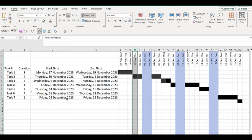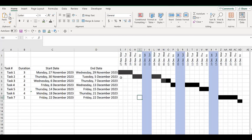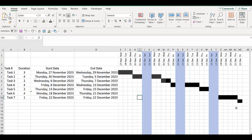This Friday is one day, but it is finish-to-start. The first task is three days, so I blocked three days. The second task is four days. It would start when the first task finishes, go for two days. Saturday and Sunday are non-work days, so it goes two days after. This is how I got the Gantt chart. This is not a dynamic Gantt chart, but many of my videos show you how to do a dynamic Gantt chart.